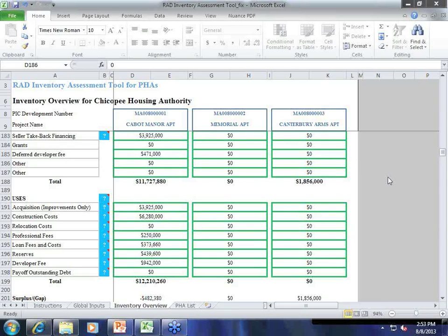You want to manage it so that the Housing Authority can stay within compliance with the VCA. Yeah, but if we're planning on doing a portfolio conversion of all our units, if we do that, we'll have to comply with Section 504. Right. But all I'm saying is that if you have a certain schedule that you need to meet in your VCA, you need to make sure that throughout your planning for RAD and your portfolio conversion you are still in compliance with that schedule, and if not, you need to talk with FHEO.